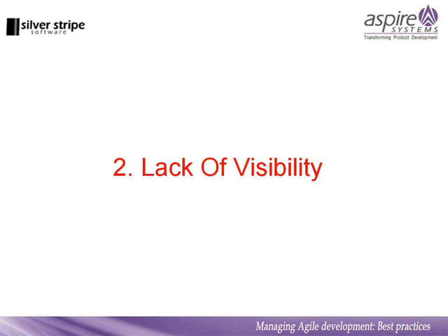What Agile does is because you do testing for every sprint, if you finish successfully one sprint, you can be pretty sure that amount of work is completed. You can put it down in your schedule that this work is done, and then you know that maybe 1/6 of your project is done. You're not going to get nasty surprises at the end of your project regarding the work that you did right at the beginning of the project.